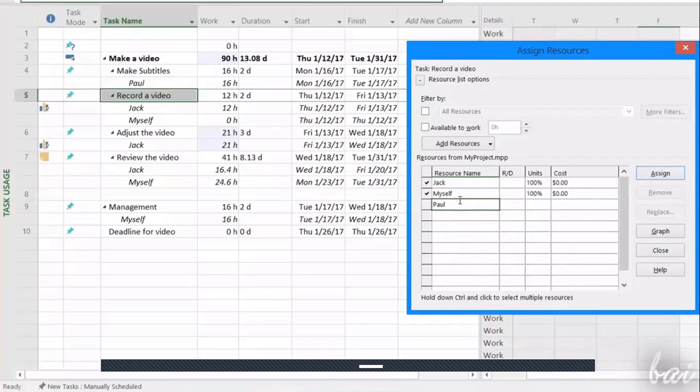These are labeled and appropriated at an organizational level. So if Ravindra is going to work on your project, they'll give you a cost of $8 per hour. These are aggregated costs for a resource, and this actually builds up the cost baselines for your project. This is how we keep track of our cost and basically build all those metrics which are required for earned value management and the cost monitoring of it. And this is how we keep doing it.